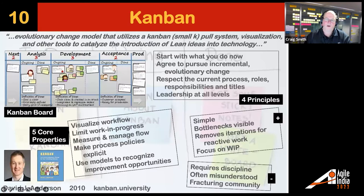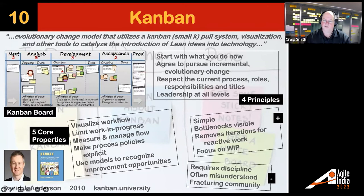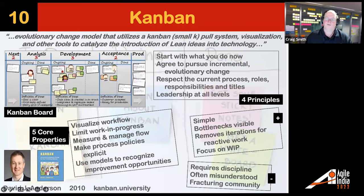Kanban is also at the lean roots. A lot of people only ever stop at the first core property — visualizing the workflow. But to truly do the Kanban approach, you also need to limit your work in progress, measure and manage your flow by looking at cycle time, make your process policies explicit, and use models to recognize improvement opportunities. It's based on four principles: start where you are, look for evolutionary change, respect the process, and everybody is a leader. Kanban does require a lot of discipline.